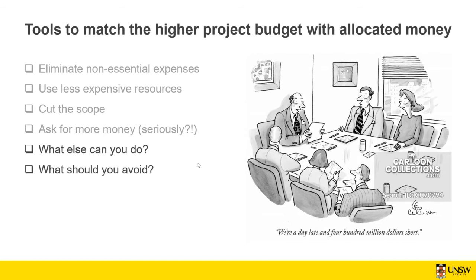Having an investment portfolio, do you mean getting the return from that portfolio in order to pay for the budget? Yeah, that can work. Bank funding. This is asking for more money, which means that you also need to pay interest, and you need to see whether the return from this project is going to cover the interest rate that you're paying or not.